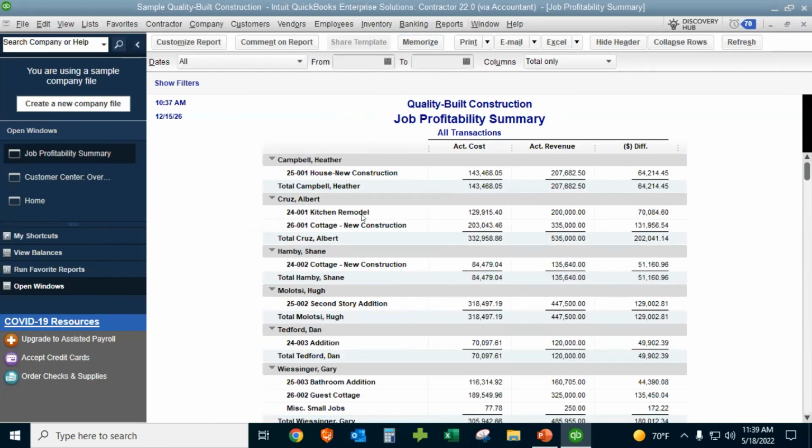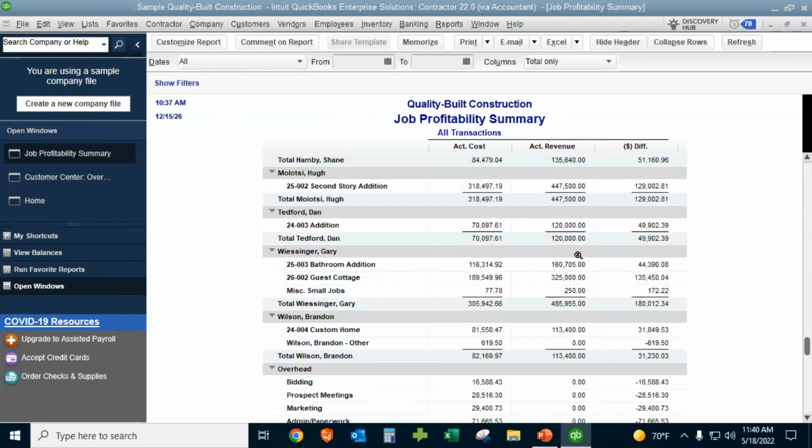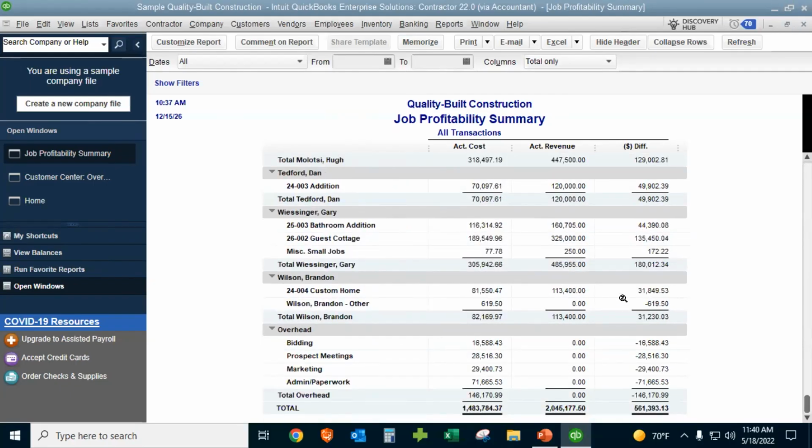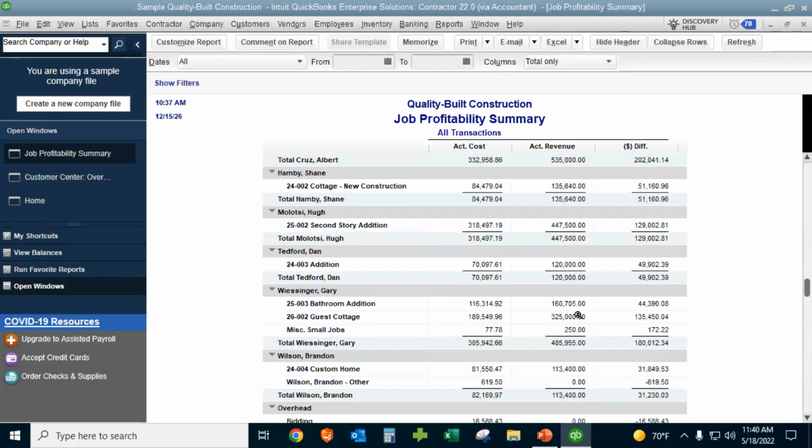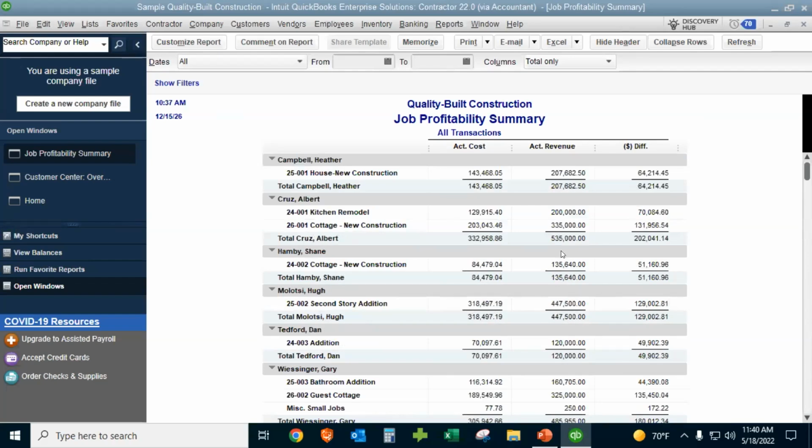A quick question before you move along, Jimmy. In this case, actual revenue is just billings, right? If you adjusted for an over/under in here, over/under billings, that wouldn't necessarily pull into revenue unless you coded it to that job, right? So most of the time, that's just going to be whatever billings you pushed out the door. Correct. Anything that hits this revenue account is going to be the result of an invoice or a sales receipt or a deposit.